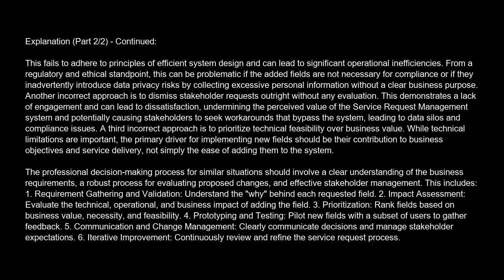This includes: 1. Requirement gathering and validation. Understand the why behind each requested field. 2. Impact assessment. Evaluate the technical, operational, and business impact of adding the field. 3. Prioritization. Rank fields based on business value, necessity, and feasibility. 4. Prototyping and testing. Pilot new fields with a subset of users to gather feedback. 5. Communication and change management. Clearly communicate decisions and manage stakeholder expectations. 6. Iterative improvement. Continuously review and refine the service request process.